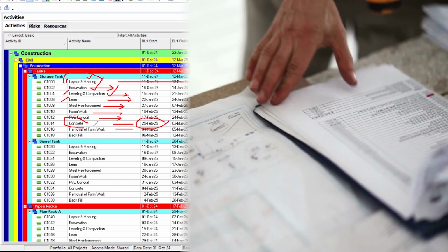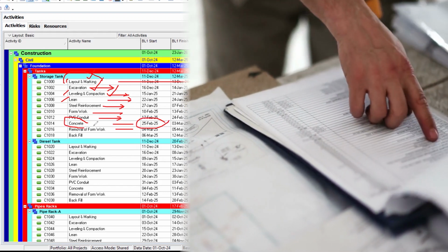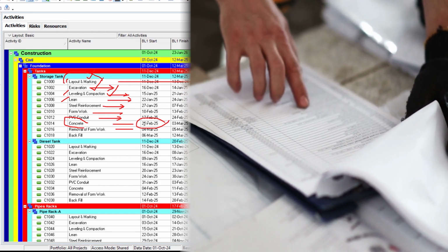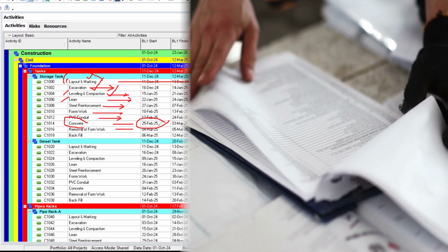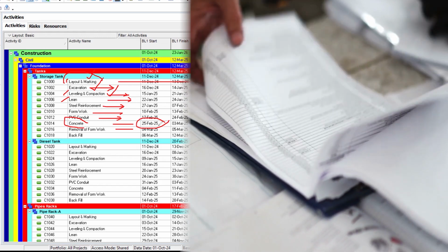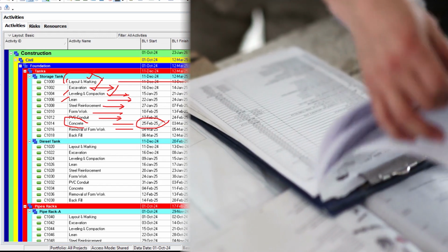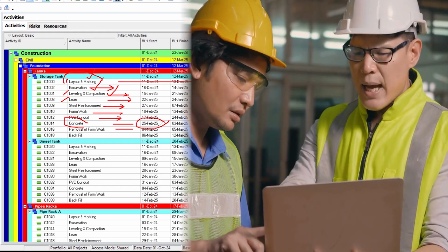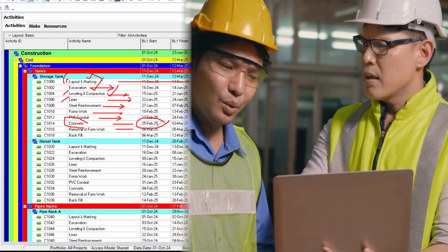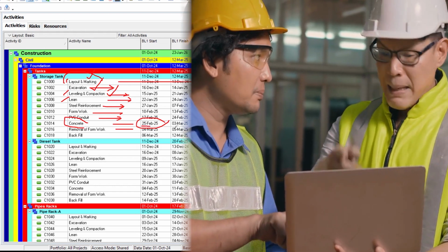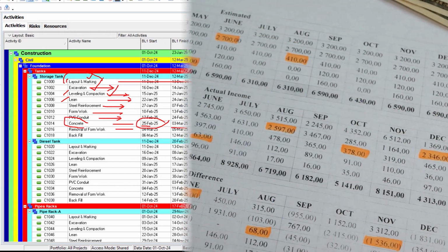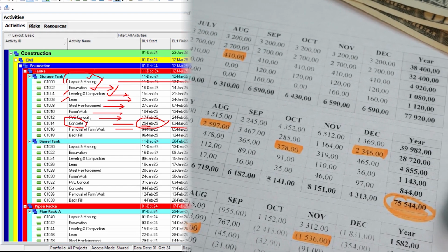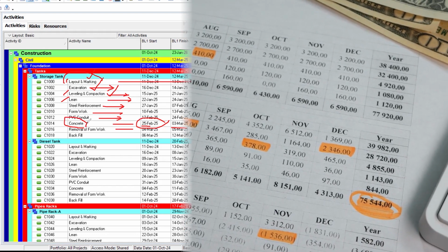So once this dependency is settled down, only in that situation can you arrange this concrete on the 25th February. So when you are doing your project planning engineer job duty, everything is very much sorted: time management, cost management, resource management. And you will understand that between 25th Feb and 3rd March, within these 5 days, you are going to bear the cost of this concrete. So your cash flow will be adding up that value as well.